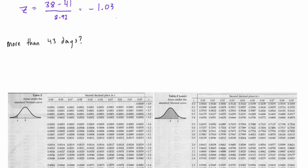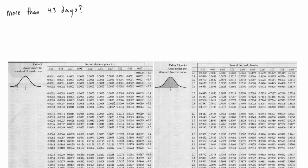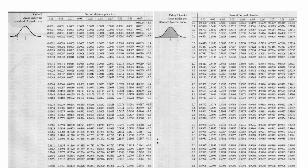Our z-score is negative 1.03, so it will be on the negative table. We come down here, first we'll locate negative 1, we have to go a little bit further than that. So we have negative 1, and it was 0.03. We come up here, and it was 0.03. So negative 1.03, we find out where those two match, and we're getting this value here of 0.1515.